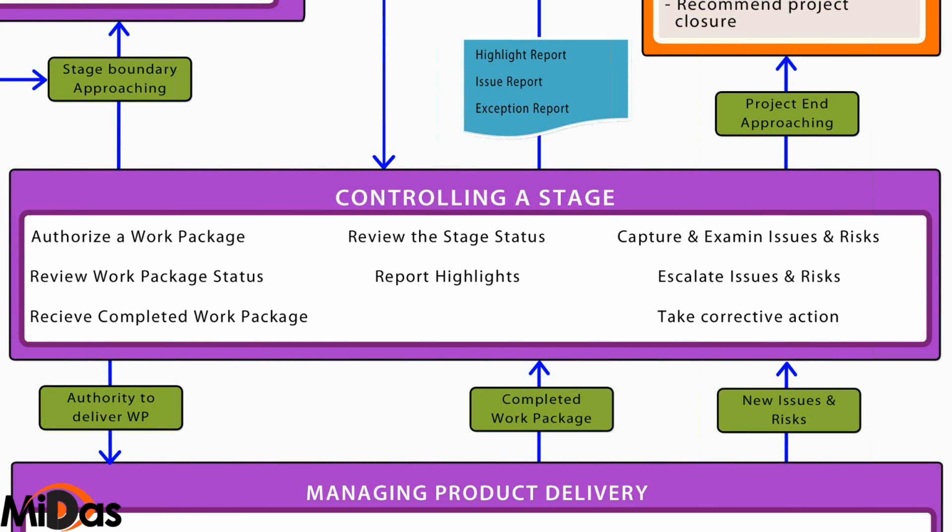So, the moment the project manager or any member within the project management team foresees a situation wherein they can exceed their authority level, they need to raise an exception to the higher up. So that is what the project manager would do here. It's a principle of PRINCE2, managed by exception. You can find more information about it online, or you can always get in touch with us.